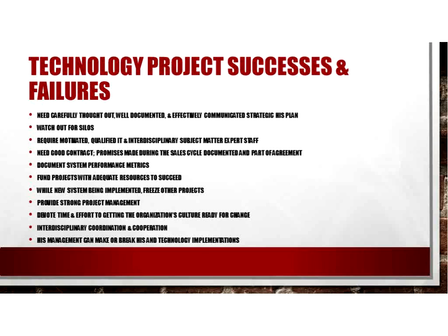The norm for support and maintenance fees is 20% to 30% of the license fees. So no organization should make the mistake of spending all their energy on negotiating the license fee and ignoring the maintenance fees. Nothing's more important than negotiating the responsibilities with the vendor for system support and maintenance.